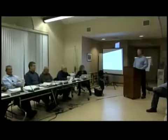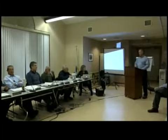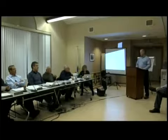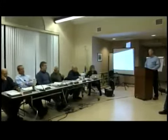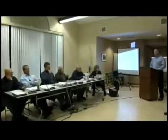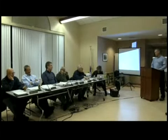The next hearing we have is the 24th. That would be the earliest we could possibly close, and then we have 21 days from that date to render a decision. If I'm away next week, I won't be drafting. So to expedite things in between the meetings, you need to work together. That's the permission I want from the commission. Does anybody have any objection to them working together? Permission granted. Thank you. We'll take care of it.